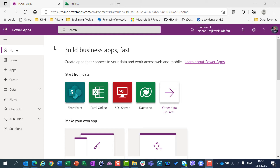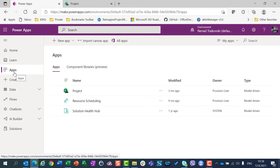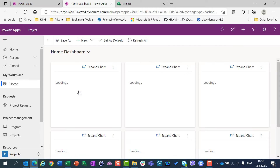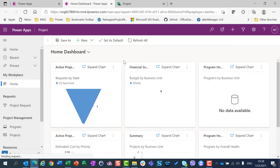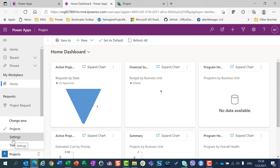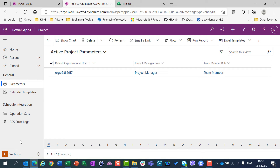There is only one way in which you can set up your preferred scheduling mode. For that you should go to PowerApps, then go to Apps and click on Project. Your screen may be different from mine because I have a Project Accelerator installed, which will be the topic of my next video. But for now, you will certainly find Settings here. Go to Settings and you will find your active project parameters and your default organization unit or units, for which you can change the default scheduling mode.